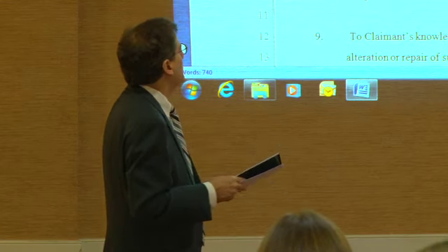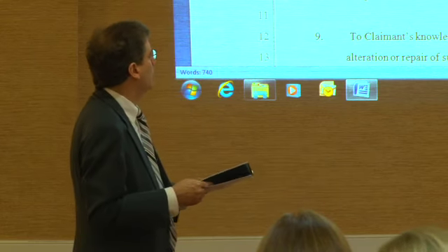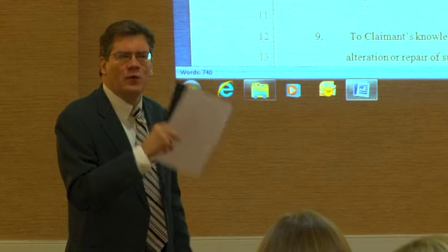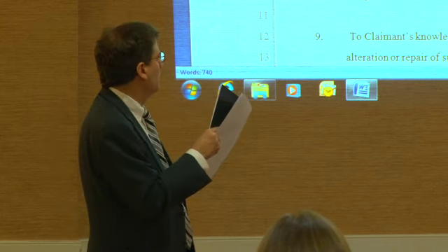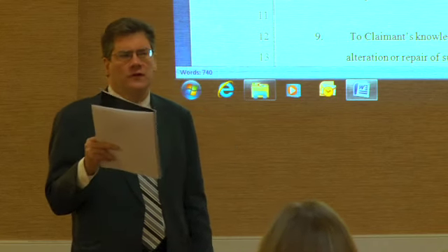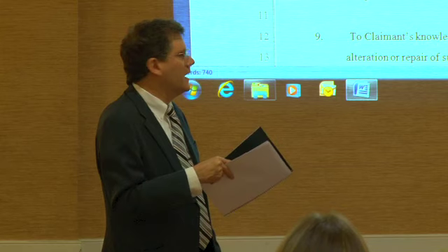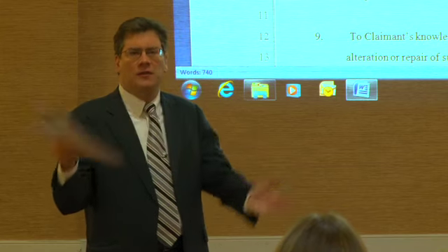Copies of the contract, change order, and invoices for paid and unpaid balances are attached as B1 through B whatever. The invoices don't have to be attached here. Okay? The invoices we frequently attach just in case there's a deficiency in the contractual terms and they're not complete.